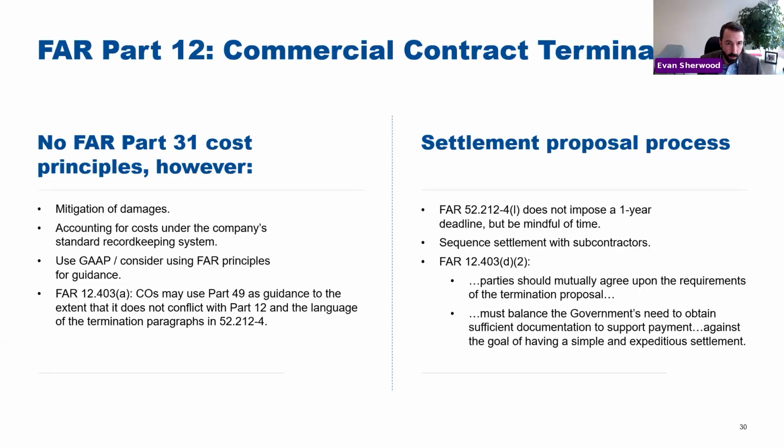Again, this is an area where getting outside assistance can go a long way. You might have consultants that recognize GAAP cost issues that could be really valuable. Issues like impairment, GAAP impairment of capital assets. I mean, that can be real money on the table you would not want to miss in administering something like this. Now, a couple of points on the mechanics.